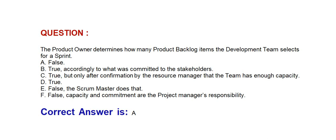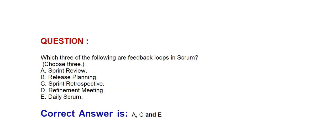Question: The product owner determines how many product backlog items the development team selects for a sprint. Option A: False. Option B: True, accordingly to what was committed to the stakeholders. Option C: True, but only after confirmation by the resource manager that the team has enough capacity. Option D: True. Option E: False, the scrum master does that. Option F: False, capacity and commitment are the project manager's responsibility. Correct answer is Option A: False.